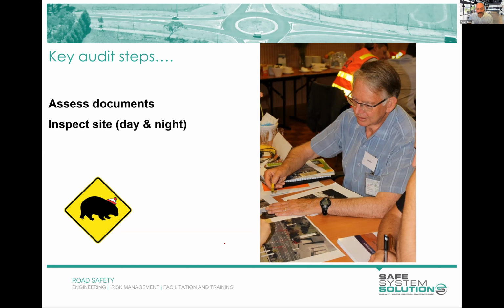Max, just talking about that relevance, actually, I had a road safety audit yesterday, and last night when I inspected it, brand new pedestrian crossing. It was a wombat crossing, so a raised zebra crossing with new luminaires installed. During the day it looked perfect. At night, the luminaires weren't switching on. So luckily we did do that night inspection, because at nighttime it's not very safe to be crossing that priority pedestrian crossing, because it's not very easy to see if you're a motorist. So very relevant. Live example.